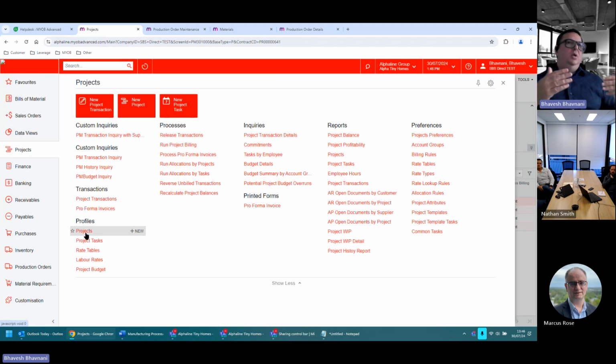Earlier, in your current projects, they go and mark it as 100% complete and then they bill the customer. So in this case, let's say that you're controlling the move transactions, Nathan, in the system, the minute you say the base is complete, you have automatically updated the project. So you can just send an email out to that person saying, I've done this. You can go and bill the customer. All they have to do is just run the billing. That's it.